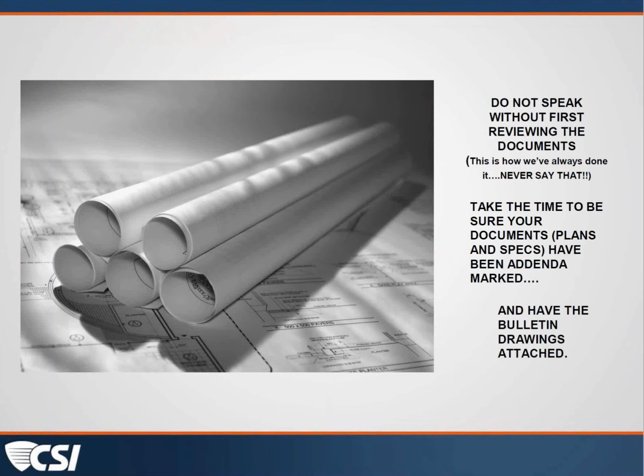Well, at the end of the job, I like to call what I get from the contractor that's redlined, where he's marked up what modifications there were in the field and has kept track of all of the changes that have been issued and submits them to the architect, the as-builts, in quotes. And then when, per our contract, we're required to take that information and combine it into a new set of drawings to give to the owner, I like to call that the record drawings.